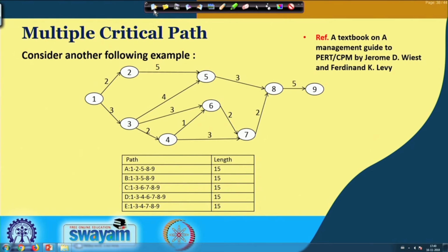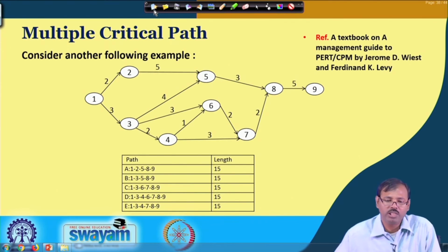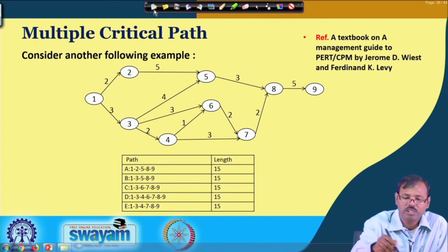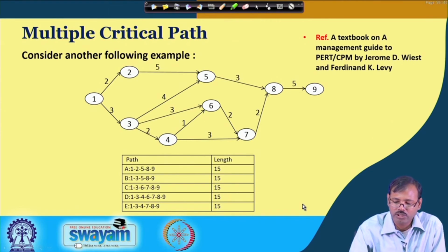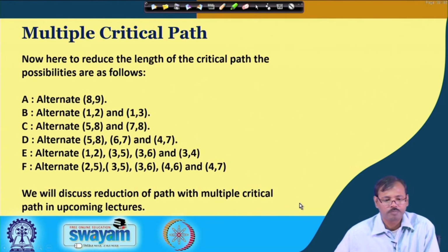Then with the analysis of the critical path, we are able to come out with the decision in which we need additional manpower and machines, and in which we can withdraw some machines or excess manpower. So, some length may be extended, some length may be shortened to achieve the target date and the required costing in these networks.